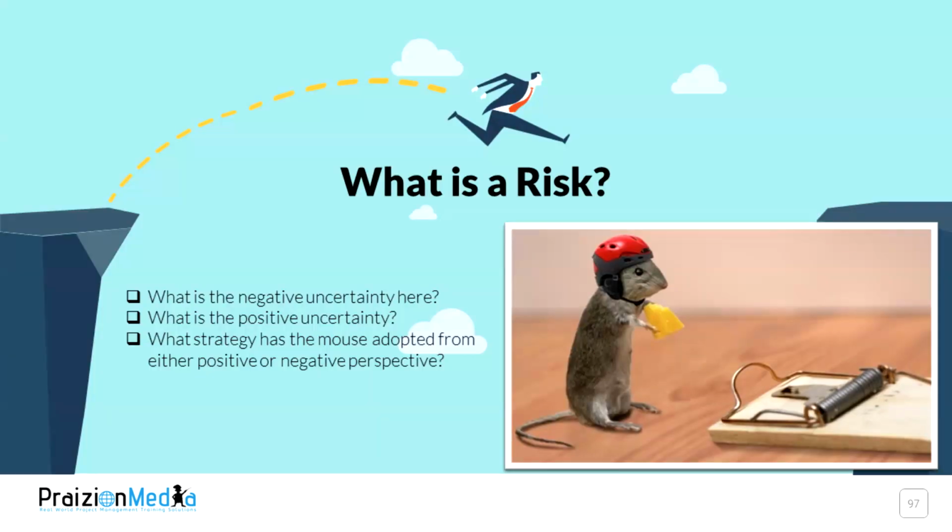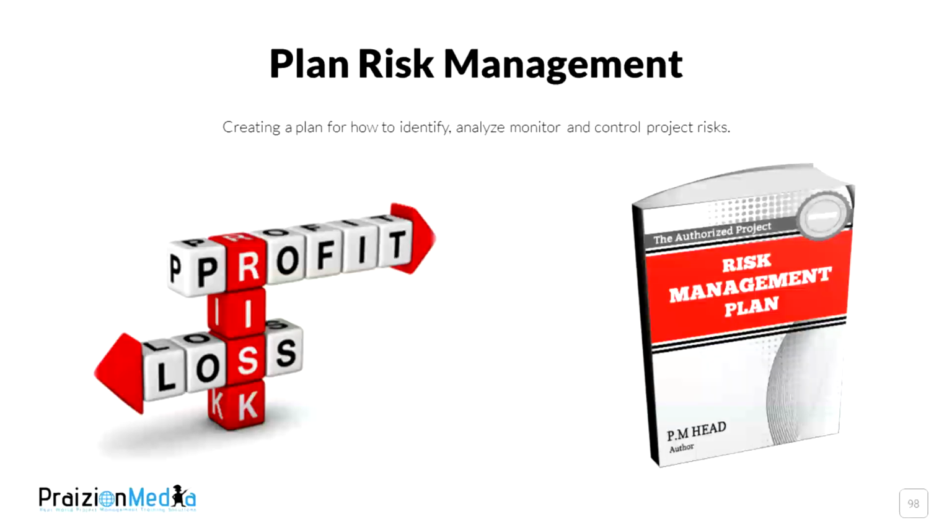Also, we need to define the definition of impact scales. So, how do you know when something is a very high risk or a very low risk or a low risk? You have to define these scales for your team so that when they give you approximations or ideas in qualitative risk analysis, the ideas will be as close to what you intend them to be.